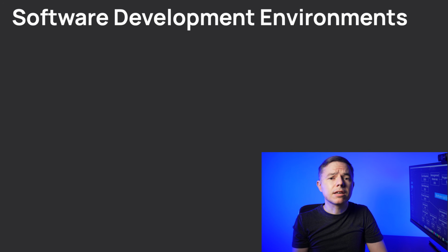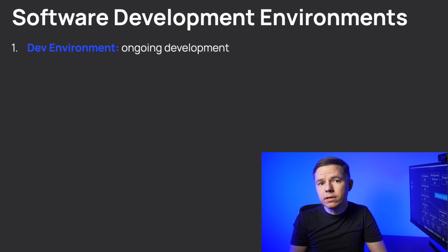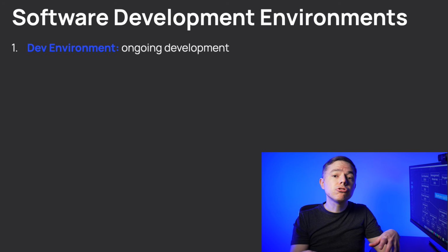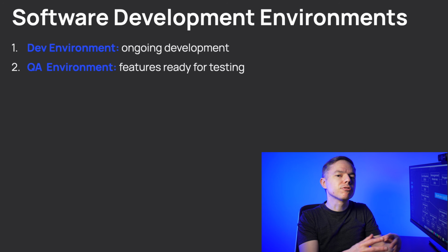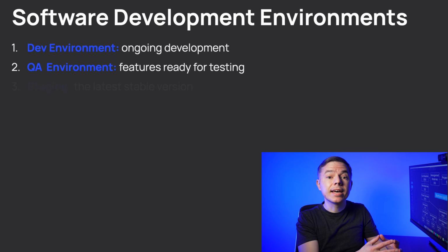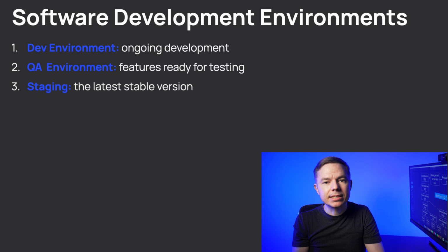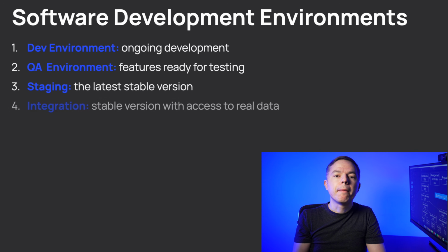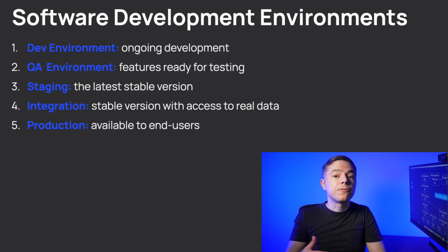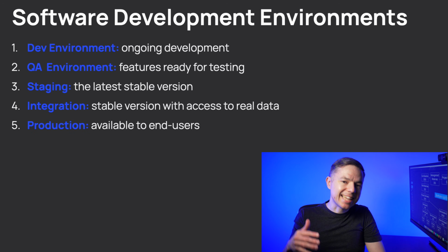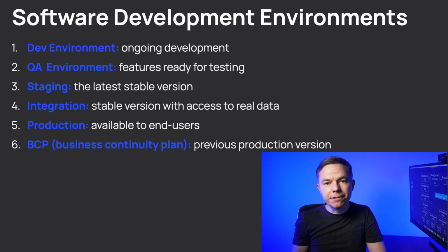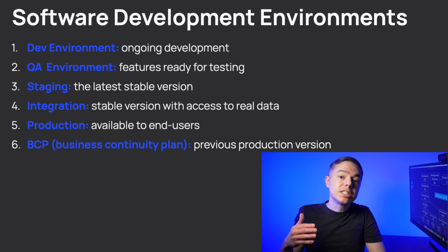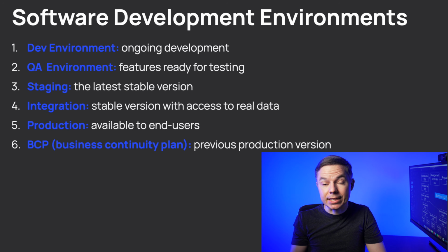Now here's a critical point from the real world. While you develop your product, you usually use minimal setup to reduce the expenses. However, software development best practices require you to have multiple environments. This means you'll need to have 2 to 5 instances of the same infrastructure for different purposes. They may have different setups and related costs.